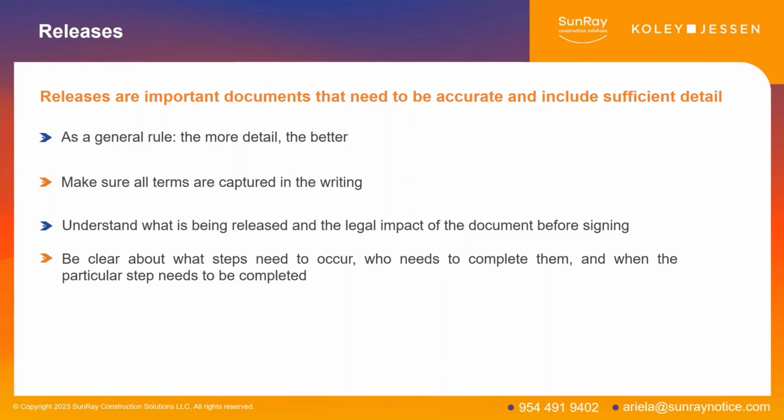The last thing that is really important to understand with regards to the big picture of releases is the release should essentially build a timeline for when things are going to occur, if it's anything more than simply releasing a construction lien, so that everybody can understand when people's obligations should be satisfied, and when you're either going to get paid or when you're going to be obligated to record the lien release.